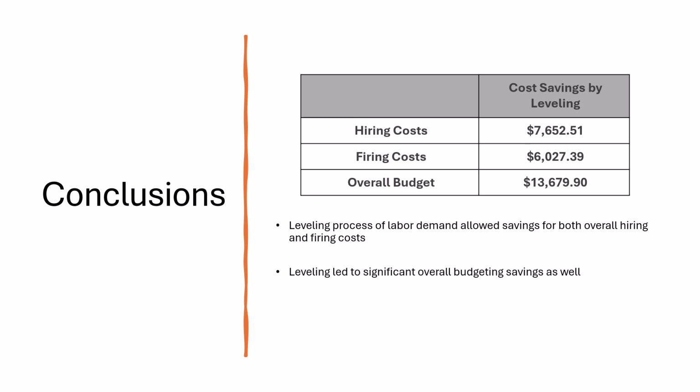Hiring costs decreased $7,652.51. Firing costs decreased $6,027.39, and the overall budget cost decreased $13,679.90. This led to significant savings for the overall project.